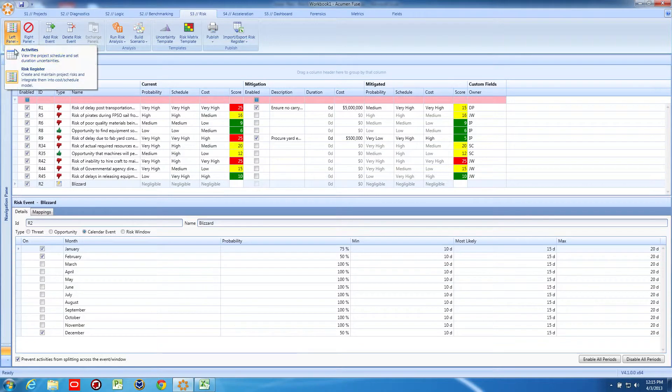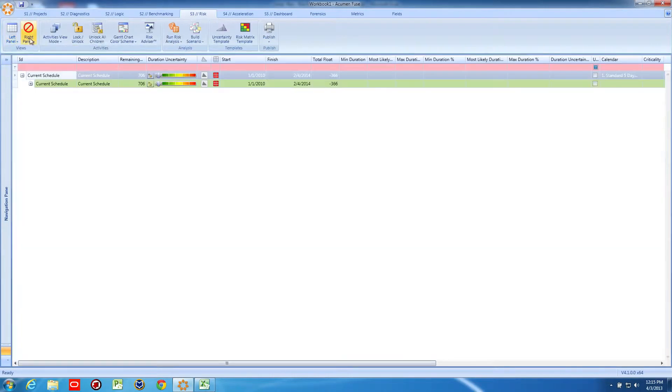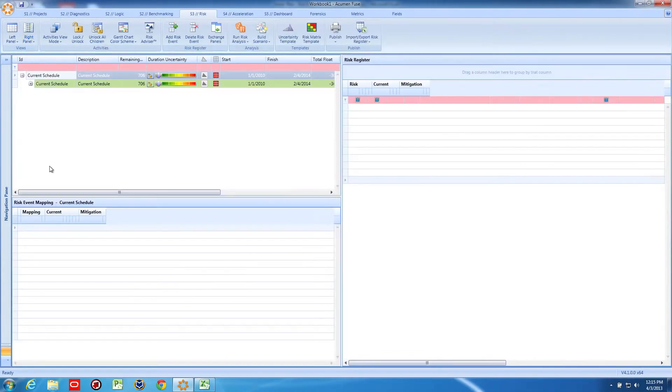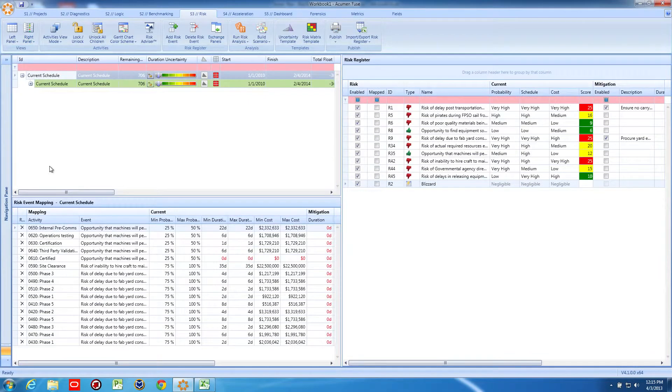The final step is to map the risk to activities or summary tasks in the schedule. You only want to map this calendar event to scheduled items that would be impacted by blizzard conditions.